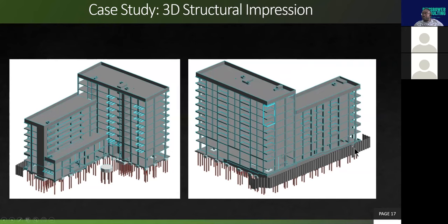Now you use a sheet piling if there is a high elevation of soil that could easily collapse into the excavated area. So you use that sheet piling to hold the soil in place, so that by the time you are excavating inside that area, no soil is collapsing on you, because it's a health and safety issue.